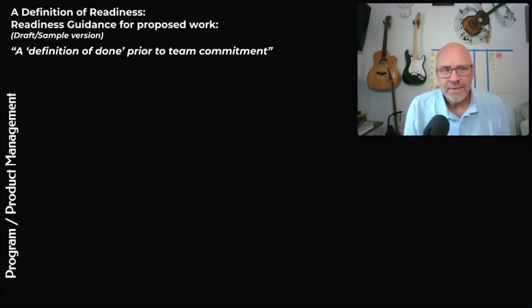When I think of a definition of readiness, I'm kind of equating this to a definition of done prior to a team committing to it. In other words, we understand roughly 80% of what's going to be needed, who's going to be needed, what the risks are, how we're going to be measured, and when we're going to be done with it, right? Or what it's going to take to get it done.